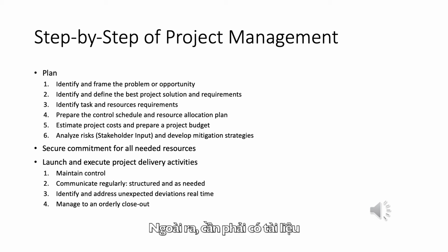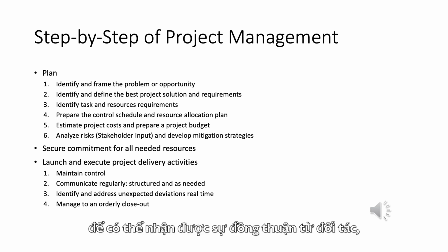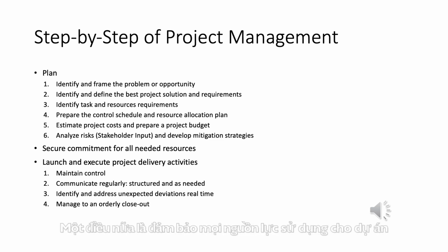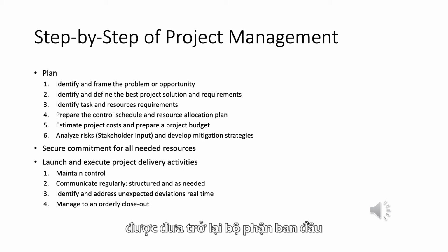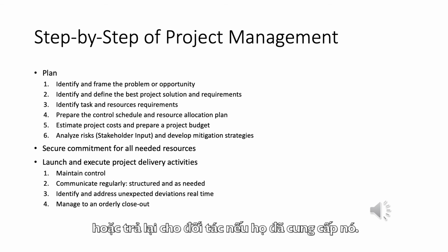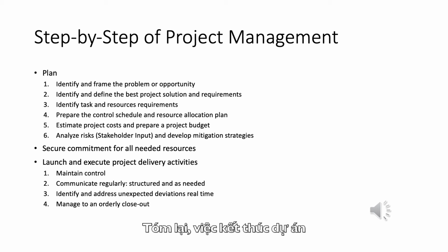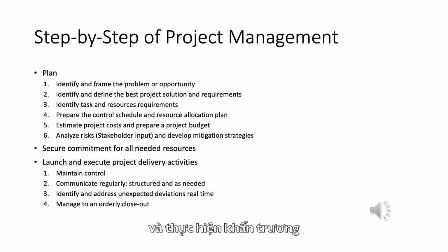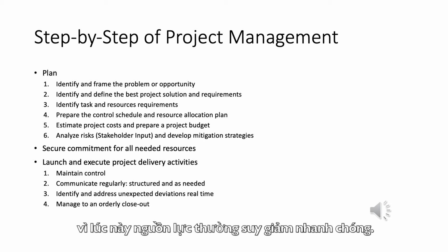There also needs to be a set of documents created to describe the outcome of the project, to get the customer to approve the outcome of the project, to make sure that all payments are completed, that budgets are closed out. Another thing is to make sure that all of the resources that were allocated to the project get reallocated back into the host organization or maybe the customer if they provided it. So there are quite a large number of activities that are required to close out a project, and it must be done in an orderly fashion and done expeditiously because resources are usually dwindling fast.